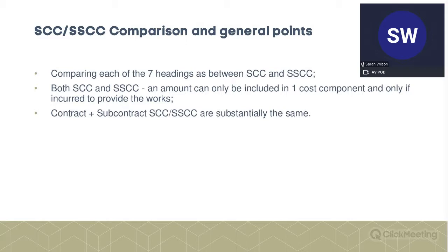But the other thing to point out to the PM, and it's the middle bullet point that I'm talking about, is that this note that you can only claim it under one does suggest there is a bit of ambiguity and the items are claimable under more than one category. I think the pragmatic approach is, if it is a genuine entitlement under one, then it should just be paid.